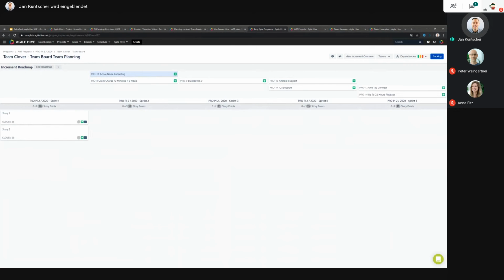So after breaking down the high level stories, the next thing that you will do is to estimate the story points of those different stories, and how the team does it is completely flexible. You can do a planning poker, whatever. So what you have to do afterwards is simply to insert the estimation, so the value. So let's say this story is a 5, and the second one we said that it's an 8.